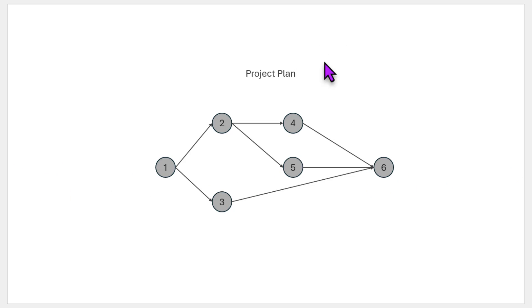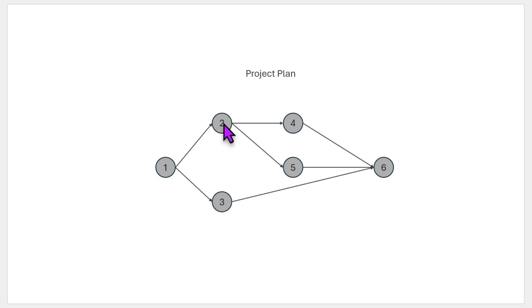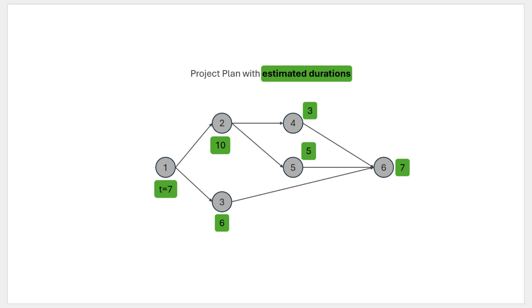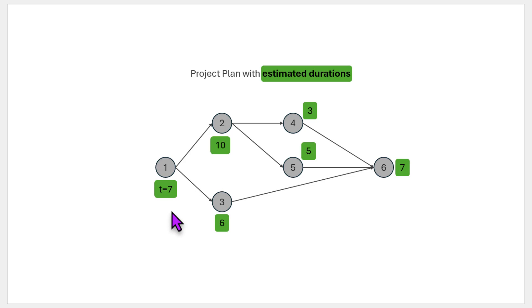Let's imagine this is how our project plan of six activities looks like. We have activity one which is a requirement for activities two and three, and then four and five are dependent on two, and finally six is the finishing activity. Now let's say this is how the estimated durations for each activity are. So the first activity takes seven units of time, let's say seven days, then you've got ten days, six days, three days, five days, and seven days.